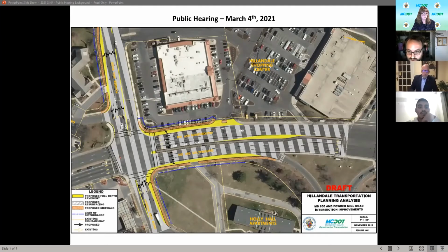And those three you can see running left and right along the center of the screen. The cost for these three treatments is about $2,354,000. And accounting also for the future BRT line, everything may require an additional 10 feet of right-of-way from each side of New Hampshire Avenue beyond existing right-of-way expectations.